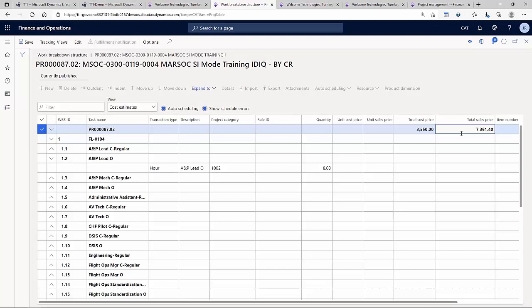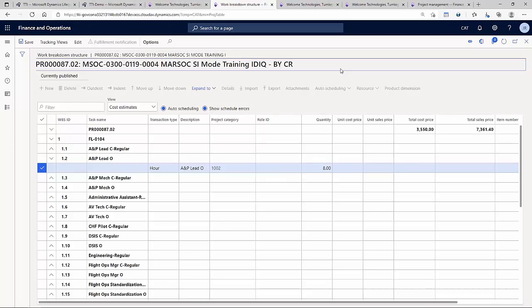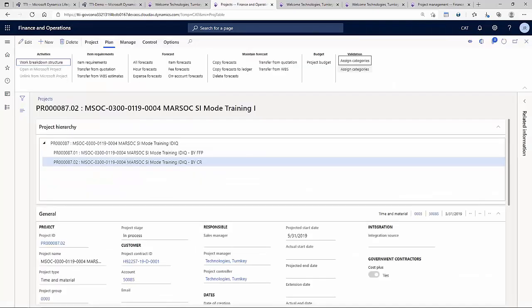This is a cost reimbursable, right? So I will have more invoicing. Why? Because I am applying a fringe, I'm applying an overhead, and I'm applying a G&A to all these concepts, right? And we can add as many lines here for the forecasted cost as we need per activity. Okay, that is going to give us what? Our budget and our forecast.